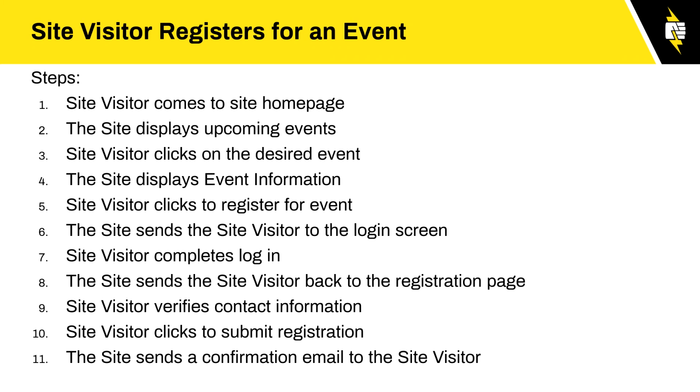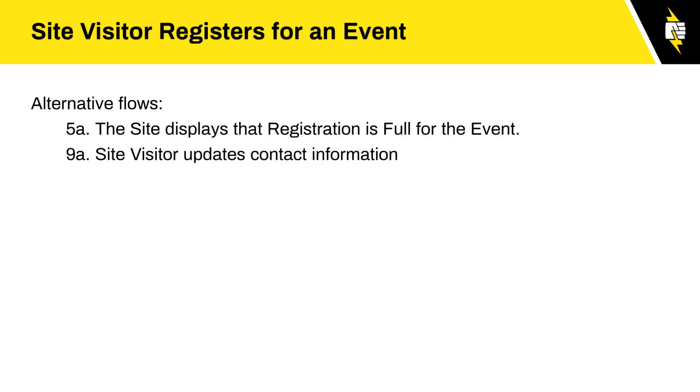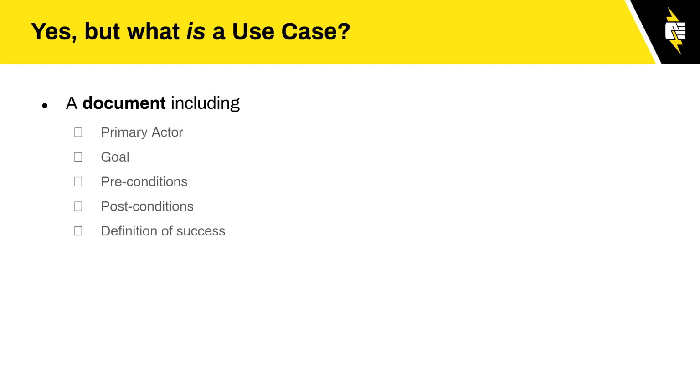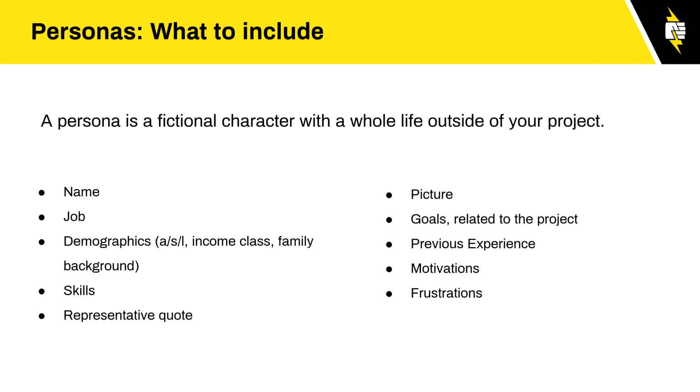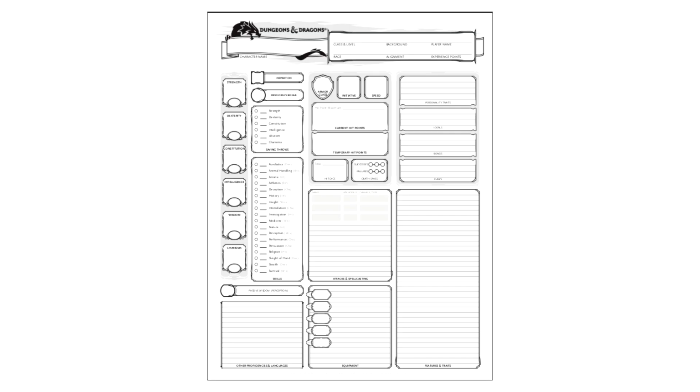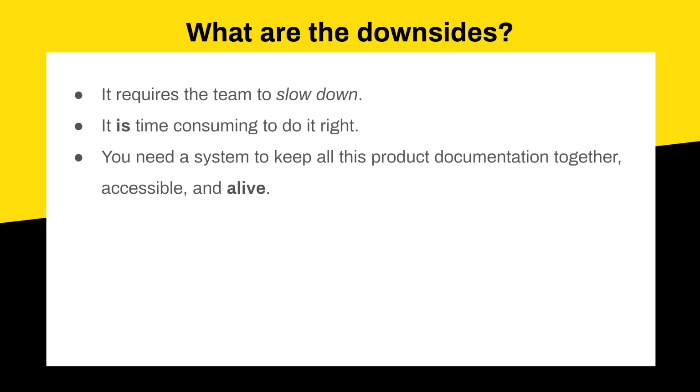This gets rid of that as an option. This ensures that you're going to have a piece that, like you were saying, you can give to the stakeholders and say, this is it. You're signing off on this. This whole package that we're talking about is a deliverable to your stakeholders. And you can say, okay, do you accept this delivery? Are there modifications? Do we need to go back and change anything?